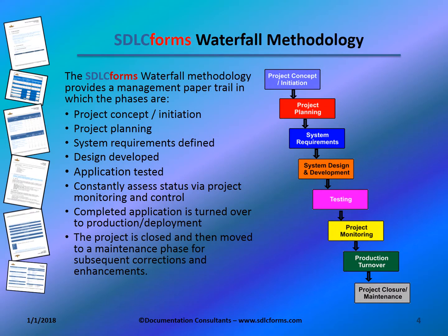The most common methodology is the waterfall methodology, which includes project initiation, planning, defining system requirements, design, develop, and test the application, with continuous monitoring for cost and schedule impact. The application is then deployed and moved to a maintenance mode for corrections or enhancements.